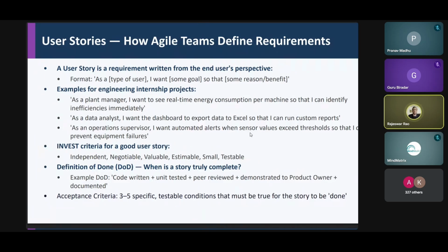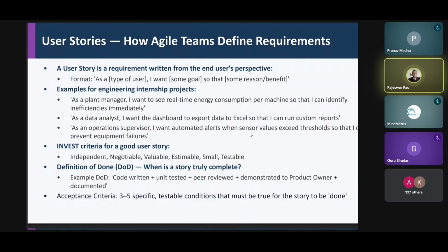They are well written, they are tested, and the requirements are traced back to the PRDs. You have done the unit testing, the integration testing, and the user acceptance testing. And finally, the product is demonstrated and accepted by the owner. The entire cycle happens in one sprint. That is when you can say that particular sprint is done, and you will move on to the next sprint.